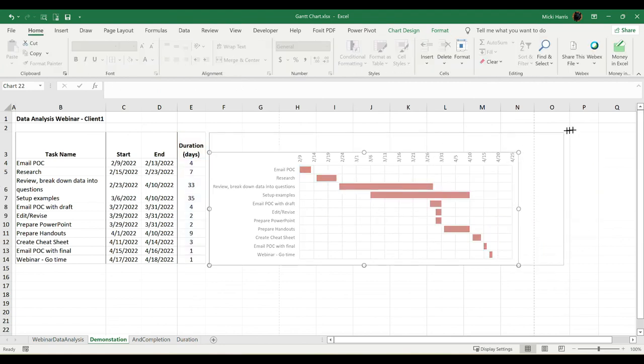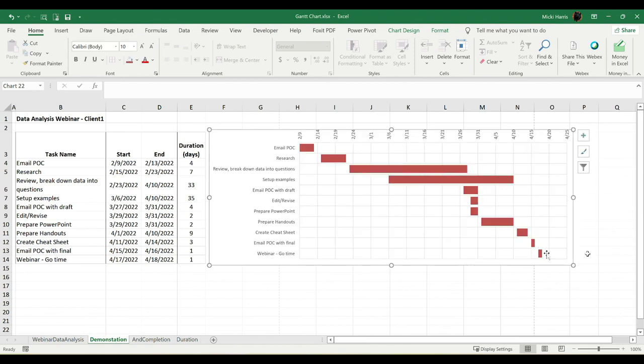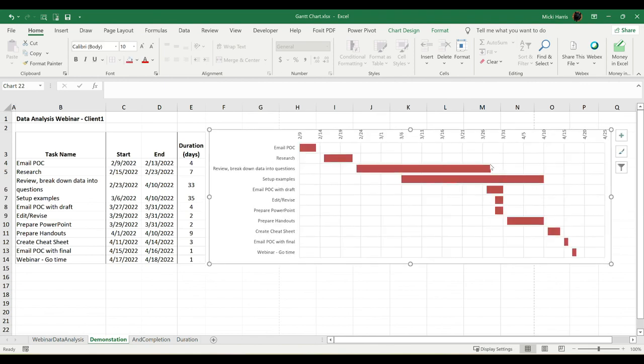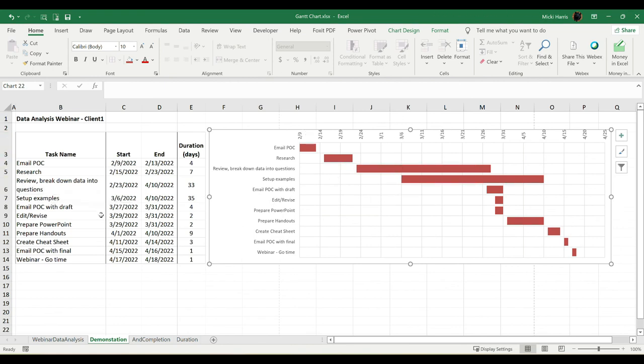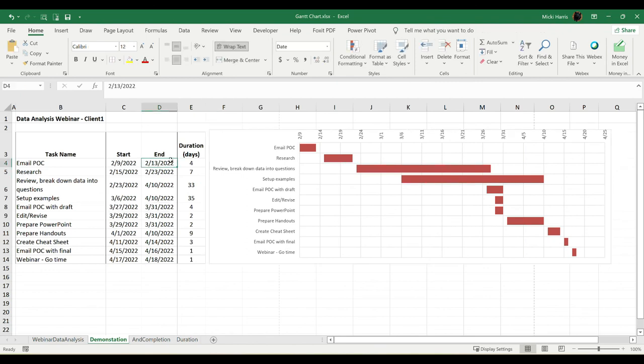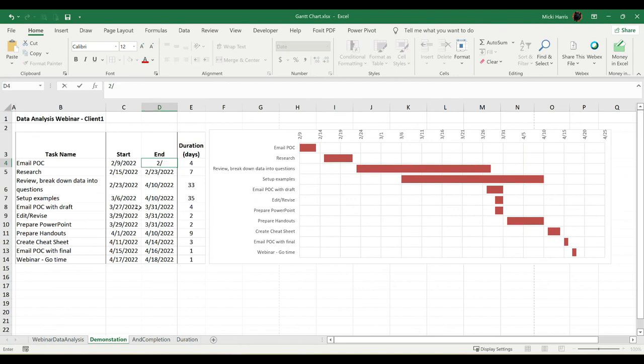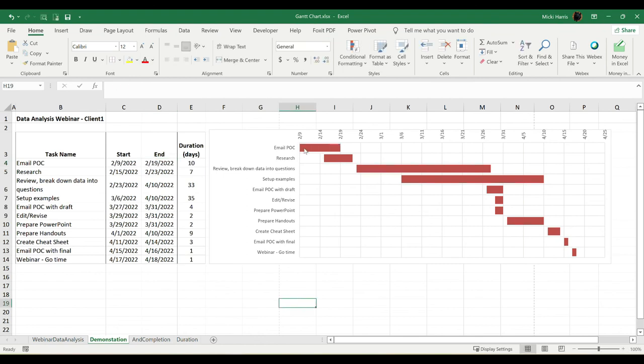And finally, I can just do some resizing. So that's looking pretty good. Now, as you update your schedule in real time, the Gantt chart is going to reflect those changes. So maybe my email for my point of contact, I am going to start on 2/9. So I'm going to say, well, this is going to end. I want it to be, I'm going to go ahead and just put in, I'll put 2/19 just to make this really obvious. 2/19/22. And you can see my Gantt chart here. It reflected that change that I made there.